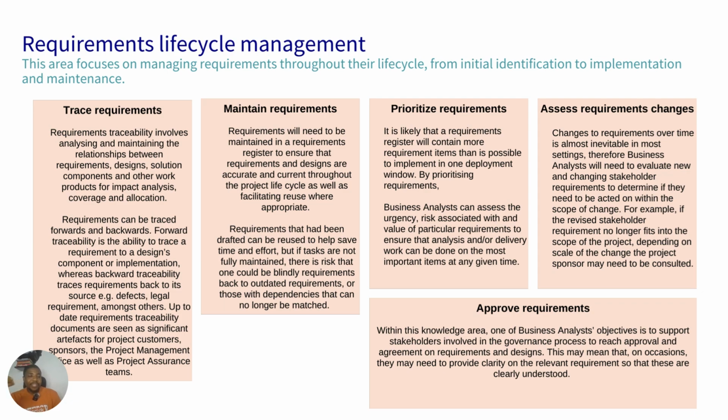It is your job as a business analyst to know how you can evaluate this change and assess the impact of this change. If I accept this change today, how would it impact the overall delivery of my project? So this is your job in this task: to assess the requirement change and know whether to accept it, to defer it, or to push it.